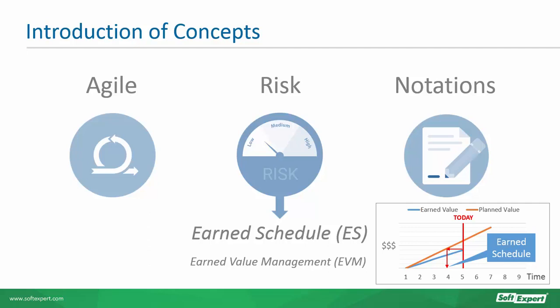Now, there is this new earned schedule concept. This idea has been included with the earned value management on the project cost issues. It redefines the schedule variance and schedule performance index, the SPI, that is used in the traditional EVM, with ES and actual time.